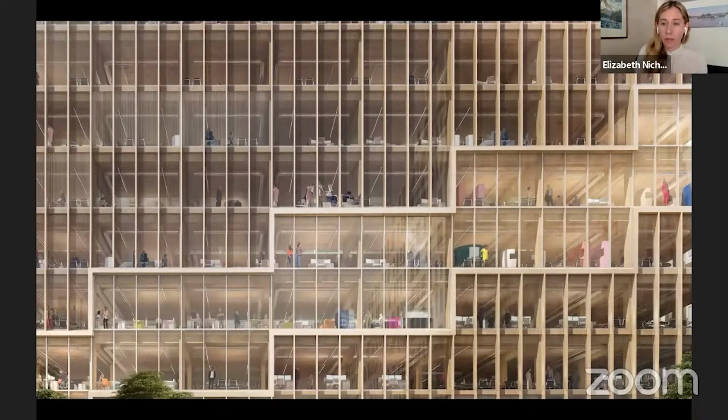make decisions on. For example, the color of the spandrel. The spandrel glass shown here, we wanted that to match the timber as much as possible, so that from the exterior, when you see the edge of slab, even though it's not truly the edge of the timber slab, we wanted it to look like that as much as possible. And we couldn't make that final decision on the color of that exterior spandrel glass until we knew who the timber manufacturer was going to be, and therefore what their timber was going to look like, what the species of the timber was going to be, things like that.